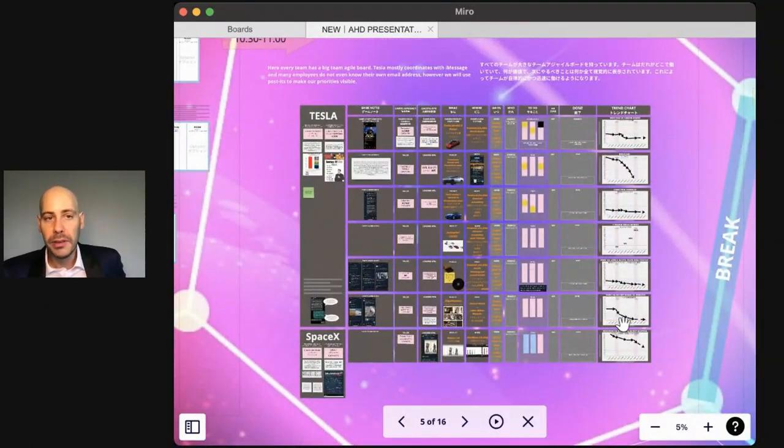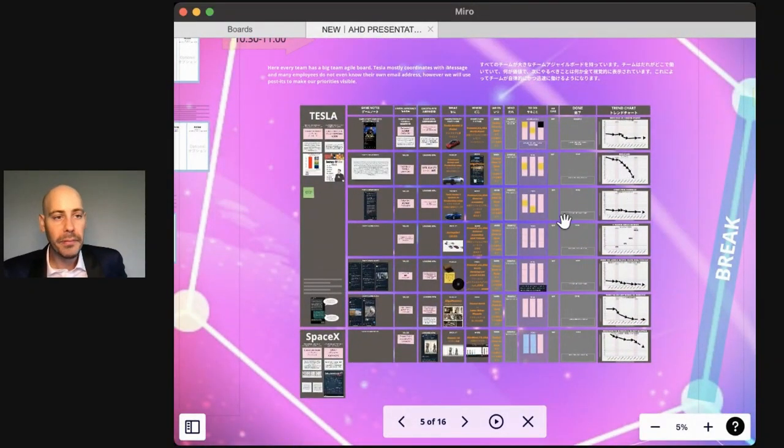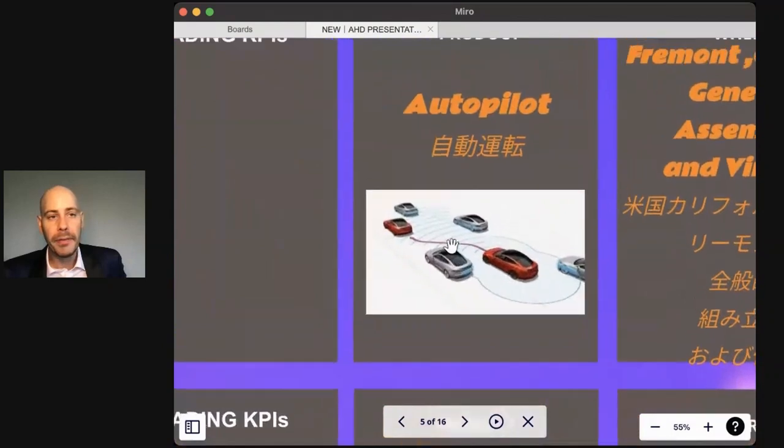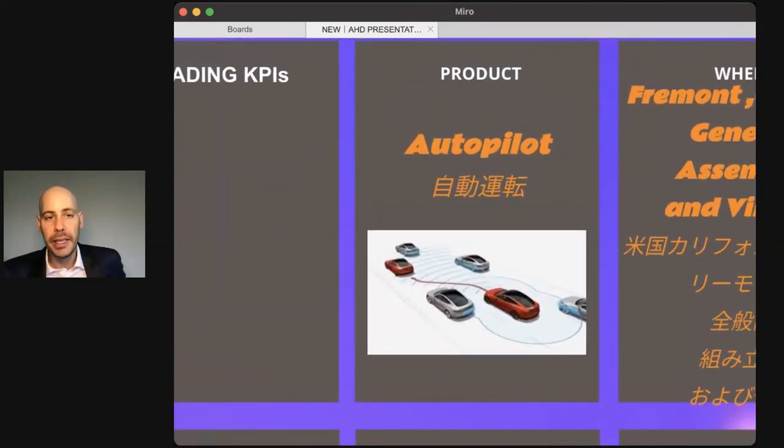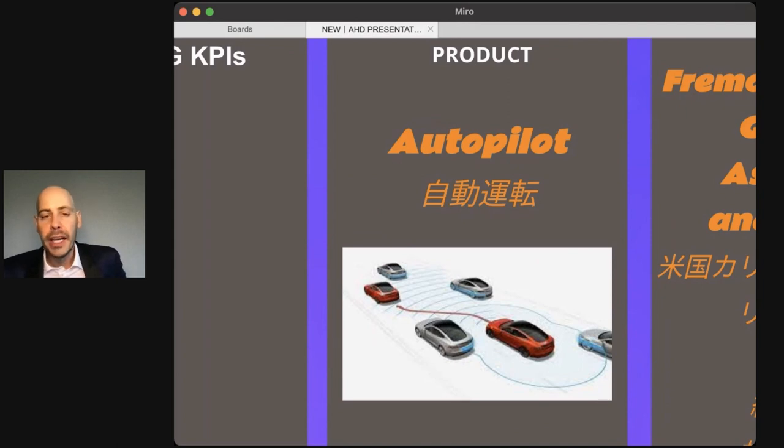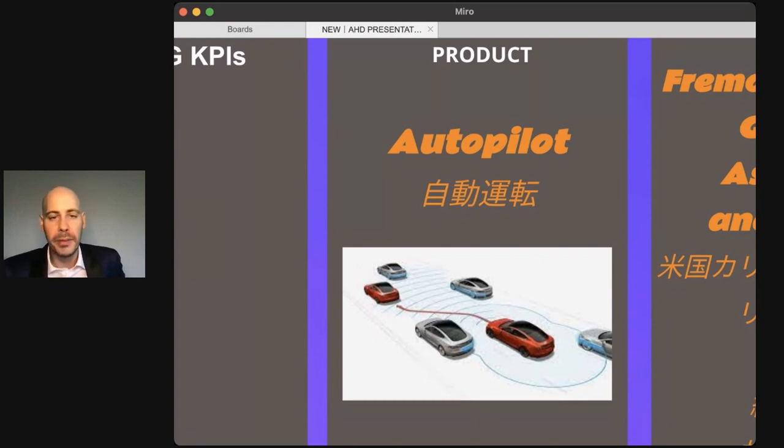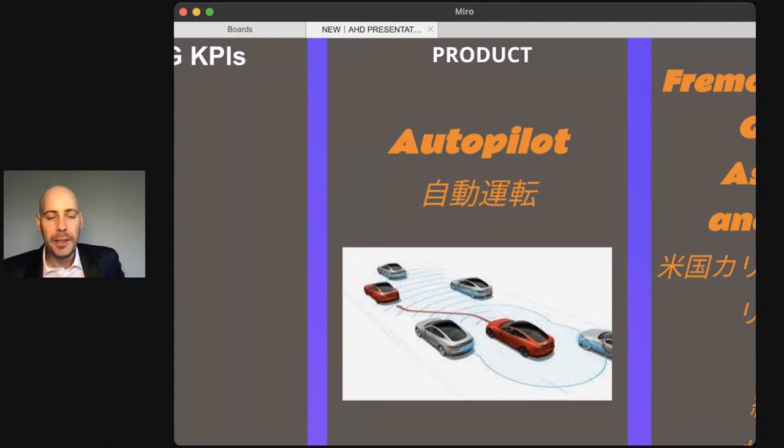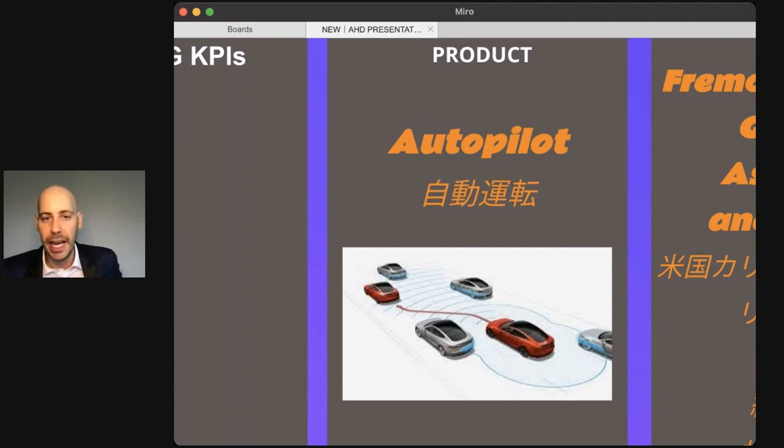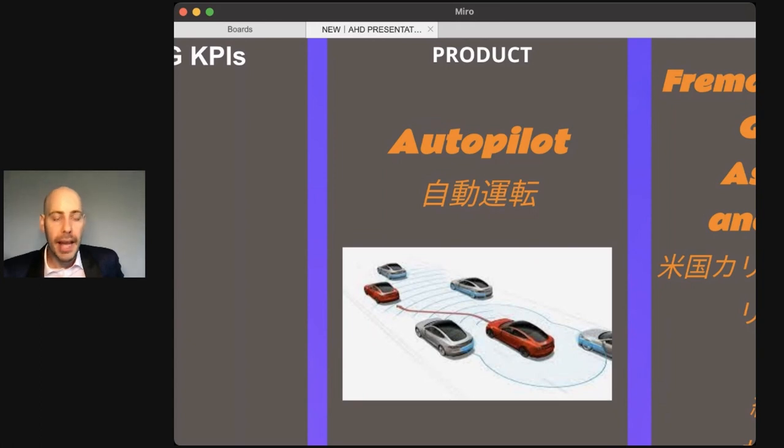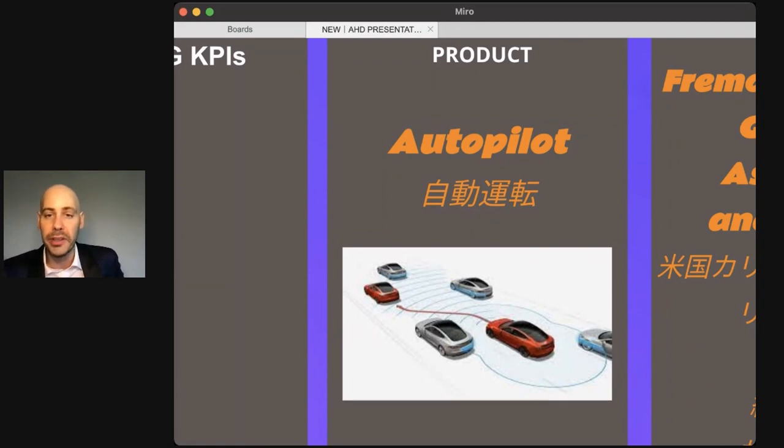Now, each of these rows has a trend and the value formula changes over time. For example, autopilot. The first value formula was, can the car drive 10 meters inside the factory and stop safely? Step two, can the car drive itself through the car wash? Step three, can the cars drive themselves onto the transport trucks? Then, step four, the cars add the capability to put themselves through homologation and road legal testing. This is key because if you're changing 60 parts a day, that means you have to re-homologate, recertify the entire car. That means every car is homologated and certified individually. The cars need to automatically test themselves and upload their own test results and ask for their individual certification, which they do. This is actually very similar to what most of us call DevOps.